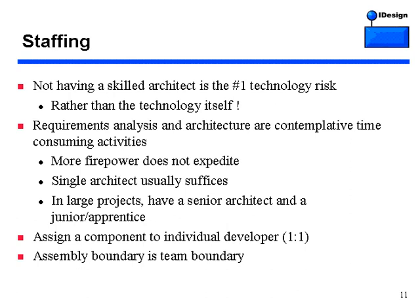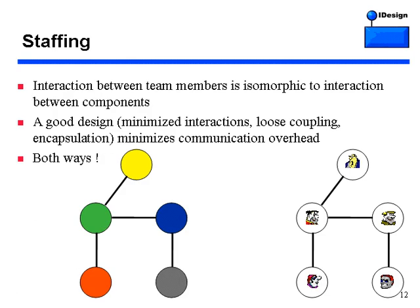One-to-one is really a good idea. I also believe you shouldn't span assemblies across teams — even though technically you can do it, it's impractical from a management point of view. Why do we like a good design? Because we have just about the right number of components and interactions. If you accept that components are mapped to developers in a one-to-one ratio, then the interaction between team members is isomorphic to the interaction between individual components.